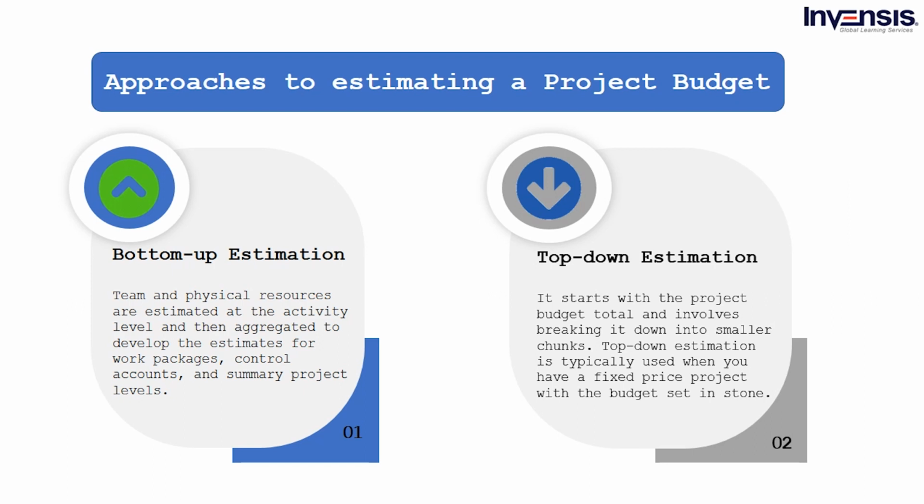The biggest downside of this strategy is that it leads to erroneous estimates during the project's initial stages. This is because it's difficult to accurately predict the budget before you understand the scope of work and have a project plan. This process may become difficult, especially if you cannot compare the accuracy of the initial quote to the final project delivery. A top-down approach can lead to a mismatch between the sales and project teams.